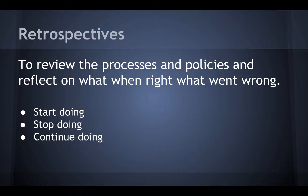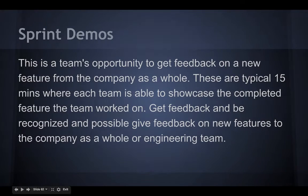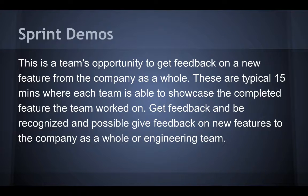Retrospectives: although there are many ways to conduct an agile sprint retrospective, our recommendation is to conduct it as a 'start doing, stop doing, or continue doing' meeting. This is perhaps the simplest but most often the most effective way to conduct a retrospective. Each team member is asked to identify specific things that the team could start doing, stop doing, and continue doing. From these insights, you feed them back into the next sprint as a feedback loop. Sprint demos: this is the team's opportunity to get feedback on new features from the company as a whole. They are typically 15 minutes long and showcase the new feature or set of features — a chance to get feedback from the whole team and company to help guide the product direction.